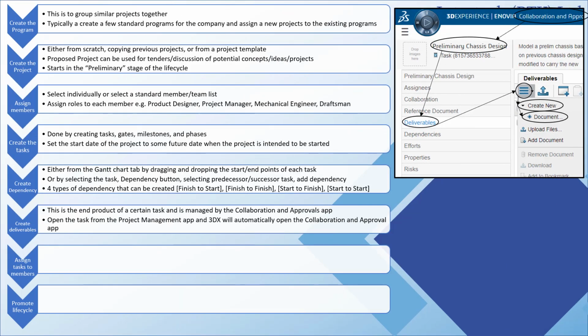Certain tasks throughout the project will produce documents, drawings, reports, or similar items that are defined as deliverables for the project. These items are known to be needed at the very beginning of the project, and so should be attached to their respective tasks at the onset.